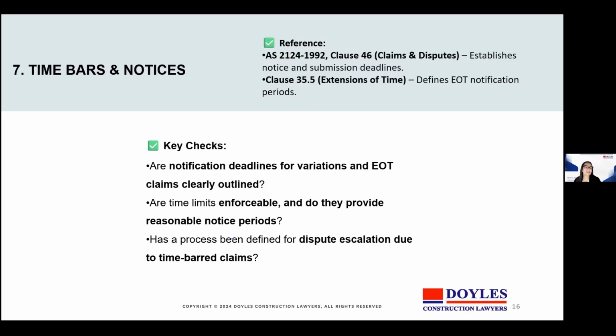Time bars and notices. Now, courts enforce time bars strictly. Missing a notice deadline often means losing the claim entirely, regardless of merit. So it's really important that you ensure notification deadlines for variations and extensions of time are clearly outlined, and that time limits are enforceable, and whether or not they provide reasonable notice periods. And if the process being defined for dispute escalation during time bars has been clarified as well.